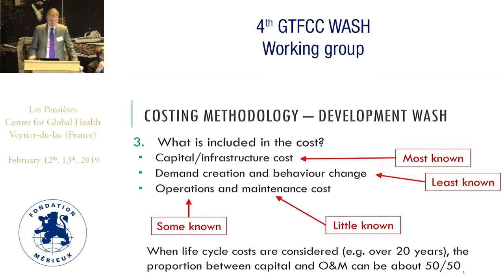And just to have an idea of where the main costs are, when you consider the full life cycle costs from the capital investment to the running over the next 15, 20 years, it's quite a balance between capital and operation and maintenance costs. So it's important to ensure those are both well represented in the cost estimates.